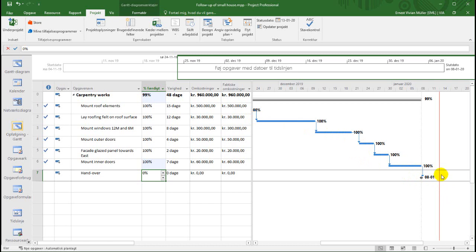Only when the handing over is accepted by the design and build contractor, who will only accept it after delivery of this contract to the client, will he say okay to the subcontractor and pay the final payment. So now we have to fill in the final interim certificate.